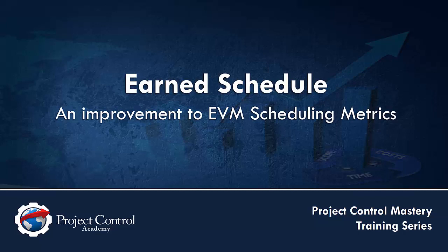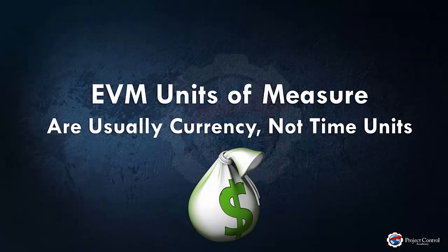Talking about earned value management: EVM is a powerful tool for evaluating the schedule and cost performance of projects and also predicting the future cost and schedule results. But existing earned value schedule performance metrics — schedule performance index (SPI) and schedule variance (SV) — do not really do a good job with schedule performance evaluation and prediction. The reason is twofold. One is that earned value metrics are measured in units of currency, typically dollars, which produces variances in dollars — useful from a budget perspective but not necessarily from a scheduling perspective.